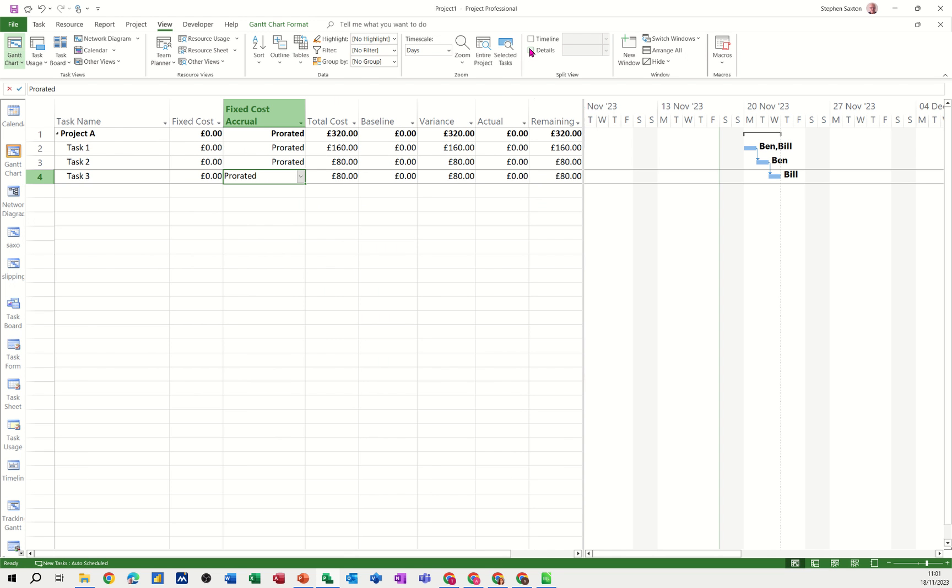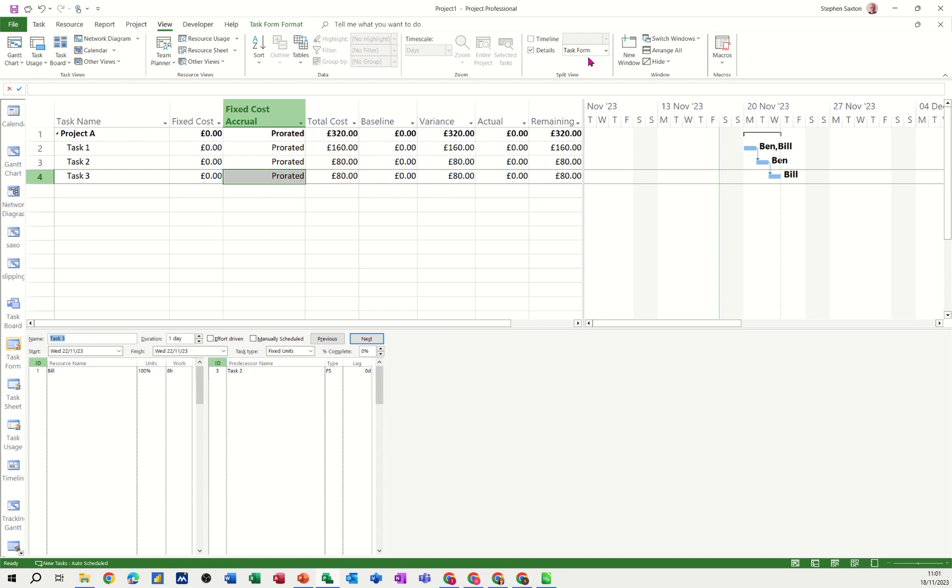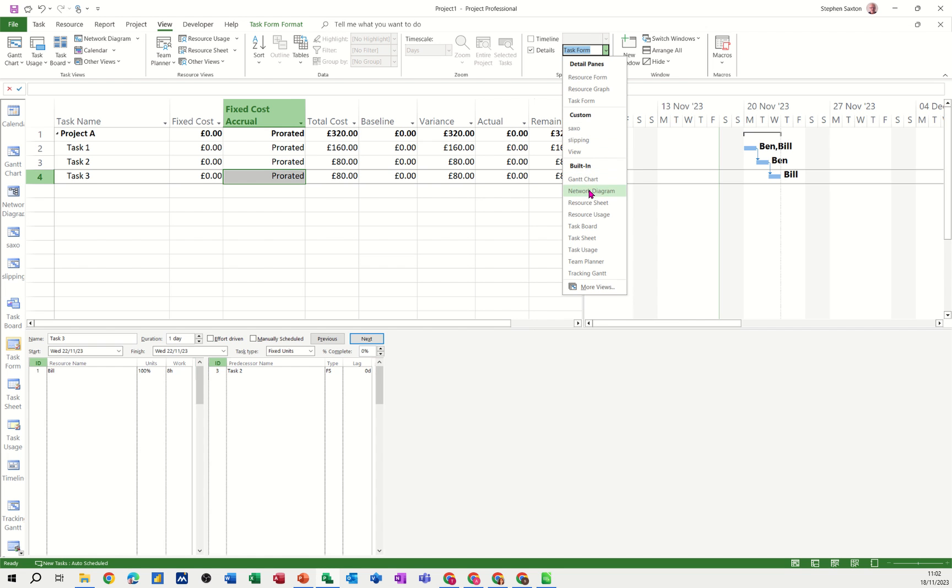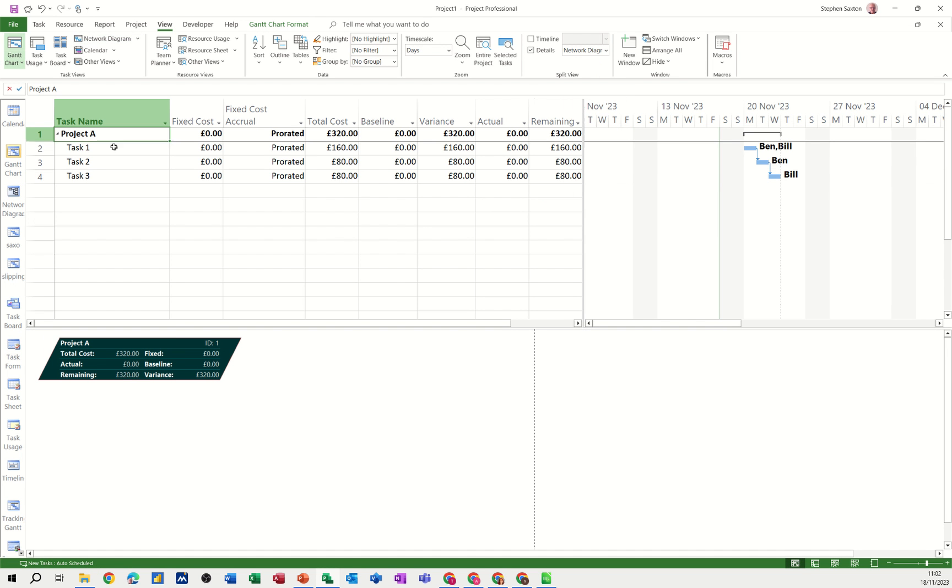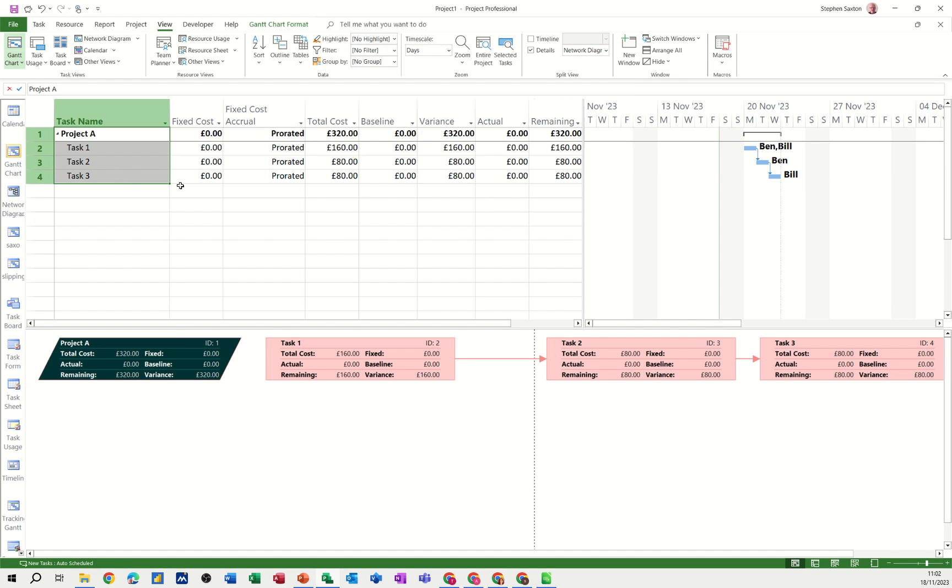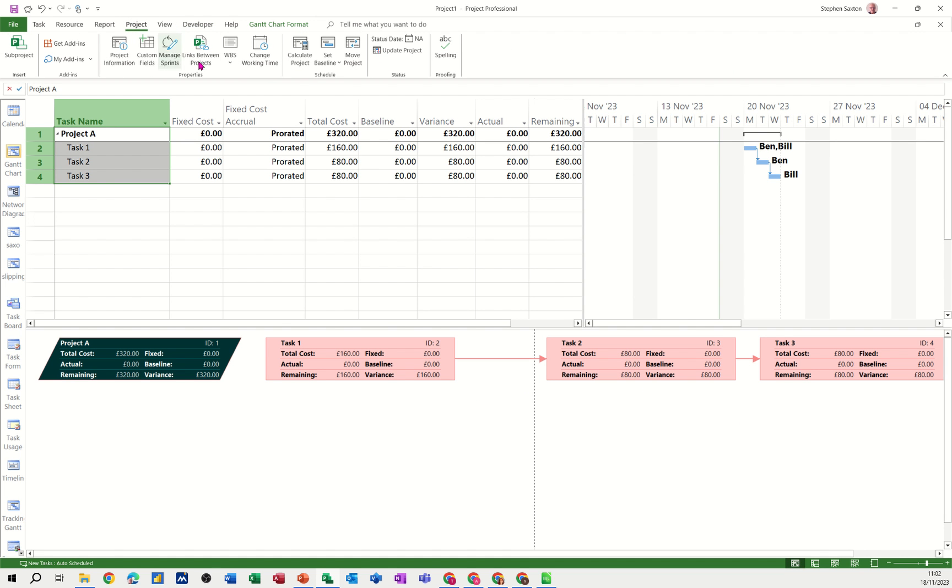If I go back to the split screen and select again network diagram, highlight these four, I'll get the whole thing sitting underneath with the cost information sitting in there. Now if I go up to project and set a baseline, this baseline column will be filled in and so will that there.